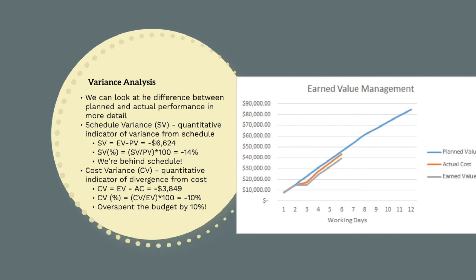Cost variance is a quantitative indicator of our divergence from our cost baseline — so how much should we have spent and how much have we actually spent? This gives us an indication of our financial performance. CV is the difference between earned value and actual cost. We can see from our project that this is negative $3,849, meaning we have overspent the budget by almost $4,000. As a percentage, we divide CV by our EV and we can see that we have overspent the budget by almost 10%. Cost variance and schedule variance are simple and quick calculations that we can make to present an accurate and objective figure as to project performance. We can objectively quantify how we are performing both in terms of time and money compared to how we originally said we would.